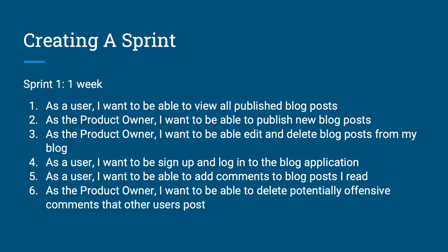The next thing I want to highlight when it comes to agile requirements engineering is the cyclical nature of agile requirements. It's perfectly possible that we get through all 6 of these stories in our first sprint. It's also possible that we run into roadblocks and only get through 4 of the 6 items, and the last 2 get pushed to the next sprint. Another possibility is that through the implementation of these first stories, we discover previously unthought of requirements and have to generate more user stories, and possibly even reprioritize our current or future sprints.